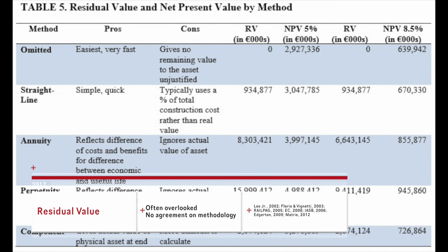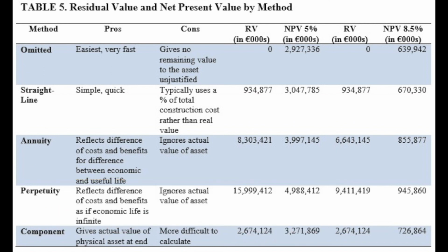One of the biggest issues is that of the life and residual value of the infrastructure being proposed. When the government bodies propose various transport plans, they are usually for a set time period. Infrastructure Victoria has set a 30-year limit on their plan. Therefore, projects that are cheaper and only meet the minimum 30-year life of the infrastructure have an inherent bias over those that are more expensive and would last longer. Typically, rail infrastructure has a longer lifespan over road infrastructure before the need for complete renewal.